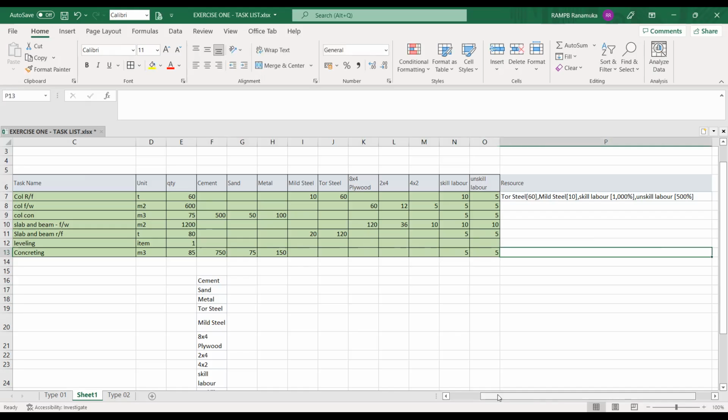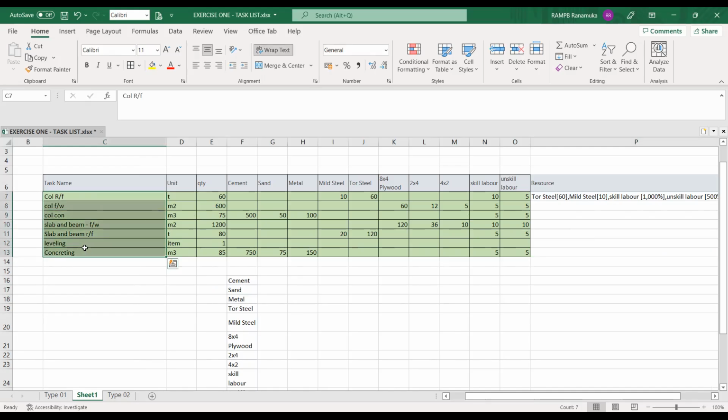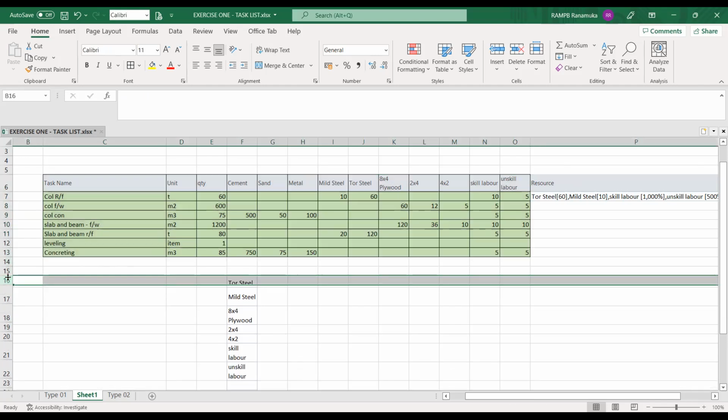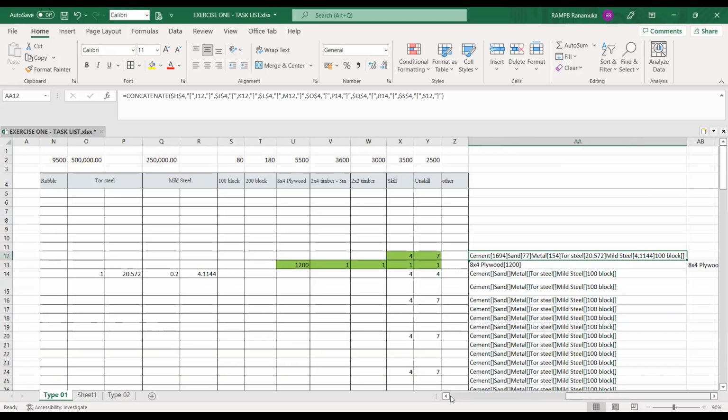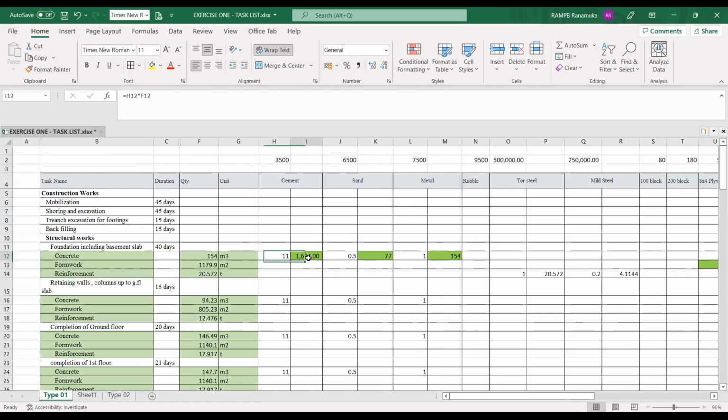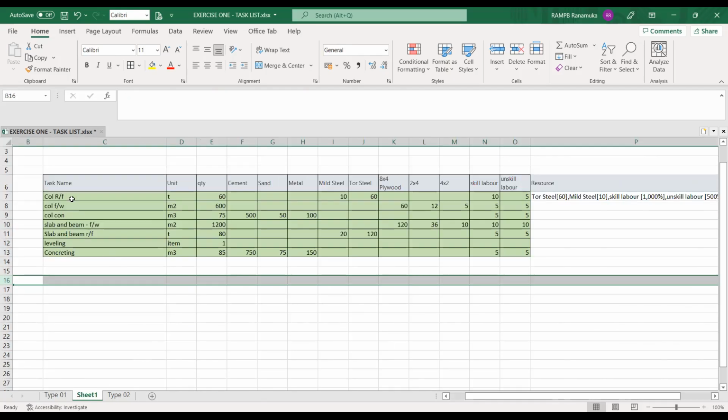This is based on our updated program. These are the quantities we get from the BOQ, and we have also listed out what materials we need to do this. We have to prepare these things with the WBS support, or everything, in the earliest, beginning stage of the program before allocating the resources. This is only for one flow that I have allocated, so likewise you have to complete the whole. In this manner we have to complete all items and the list of resources for each and every quantity. So this is the sample one.